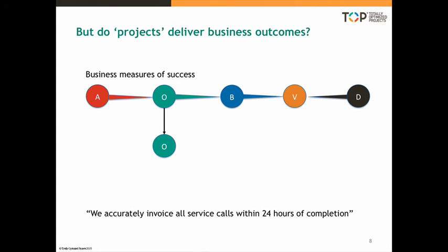What do we mean by that? So we have our outcome of we accurately invoice all service calls within 24 hours of completion. The subset of that was within 5 days of completion. So the project will get the process down so that we are accurately invoicing all service calls within 5 days of completion. Until it gets to that point, it hasn't finished, because that's its measure of success.